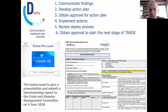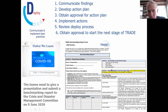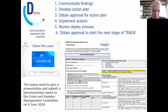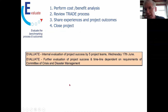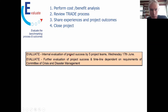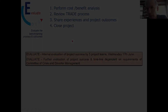The next stage for the benchmarking teams is to give a presentation and submit a benchmarking report to the Crisis and Disaster Management Committee on the 9th of June 2020. The report will share the title of each best practice idea, an overview, current state, recommendations, expected benefits and impact. Finally, we'll do an evaluation of how successful the project has been — both an internal evaluation and feedback from the Crisis and Disaster Management Committee itself.